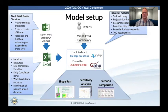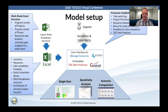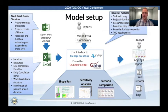Since we added variability, we were able to run the model in three ways. You could run it as a single scenario, where you view the projects being completed as the model executes. You could also do a sensitivity analysis, where you choose a specific parameter, increment it in predetermined steps, and see what is the impact on the key performance metrics. And then the third mode, which we're going to be demoing today, is a scenario comparison, where you literally compare different ways of managing your projects. The output of the model can either be viewed inside the model, in Excel reports, or in log files.